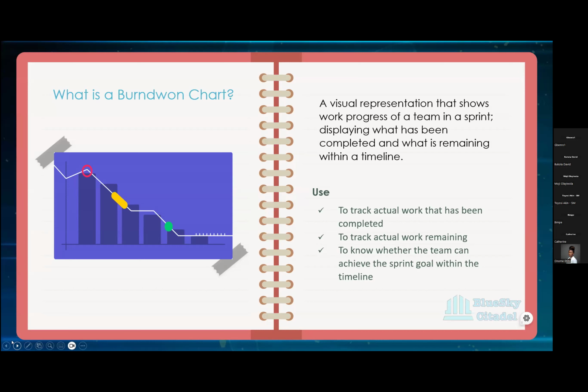So you're looking at 2 days to the end of sprint. We still have maybe 35 work items to complete. And the good thing about the Azure DevOps chart is it gives you a projected timeline. So it looks at the pace at which the team has been working, looks at what is remaining, and then it projects the days that you can complete that. So at times you're 2 days to finish and it's projecting 19 days more to complete the work that needs to be done, because it has calculated the pace at which it notices work is burning down, and it has used that to project the date.